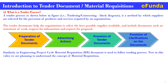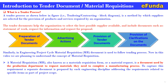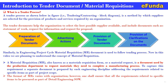Similarly, in an engineering project cycle, a material requisition (MR) document is used to follow the concept of material tendering process. A material requisition, also known as a material requisition form or material request, is a document used by the production department to request materials needed to complete a manufacturing process. To capture this requirement, a separate document is prepared by each engineering discipline addressing the requirements related to the specific item as part of the project scope. The format of MR varies with organization; however, one shall ensure that all requirements related to the specific item to be procured are covered as part of the detailed engineering scope of work.